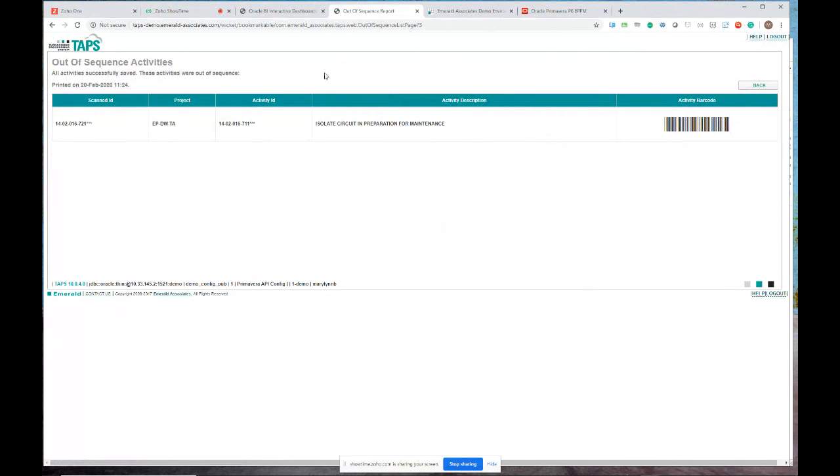Now, we did say that we wanted out of sequence activities. It's telling me that I missed something here. So I've got the perfect opportunity here to go back and confirm, was this activity done? Is it actually truly out of sequence? Maybe somebody missed it in an update, those types of things, to confirm that you've got the right information in your schedule before you start issuing reports.